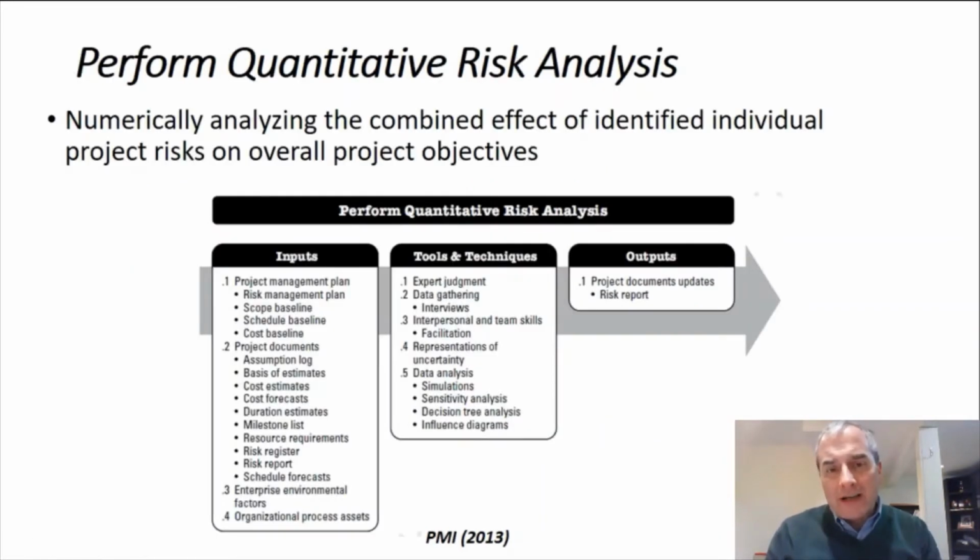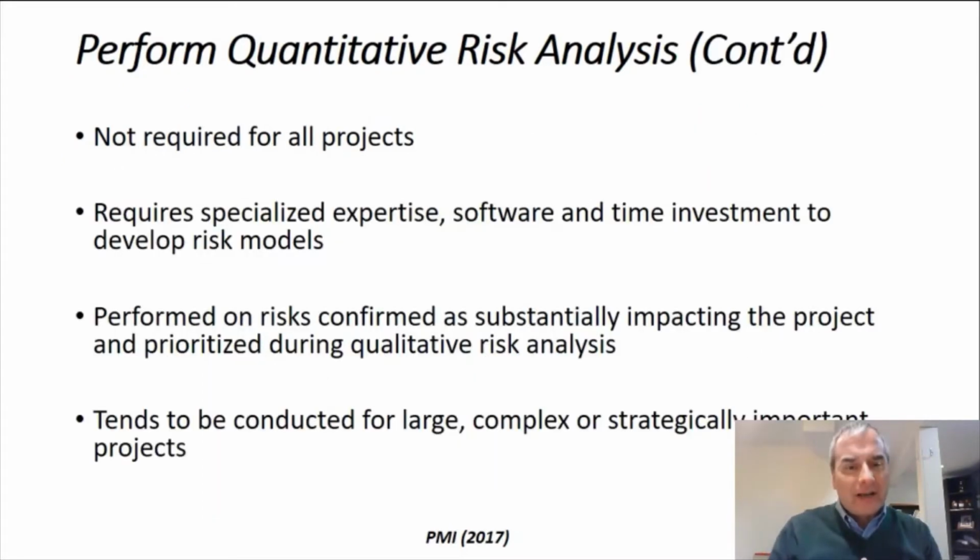So now we've prioritized the risks, and now we look at quantitative risk analysis, which is numerically analyzing the combined effect of identified individual project risks on overall project objectives. Quantitative risk analysis is a bit more sophisticated than qualitative risk analysis. The good news is it's not required for all projects. It requires specialized expertise to do quantitative risk analysis.